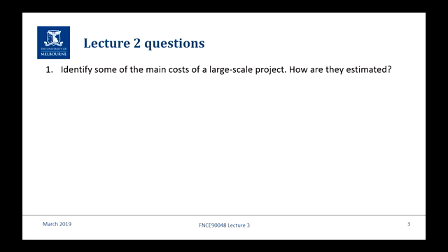Number of kilometres times diameter of the pipe times material composition. That sort of thing. There are other things that aren't so easy to estimate in terms of the construction costs. Even though you've got a construction contract, you're not going to be able to be 100% sure that the construction materials cost what you're forecasting, especially going out a few years.